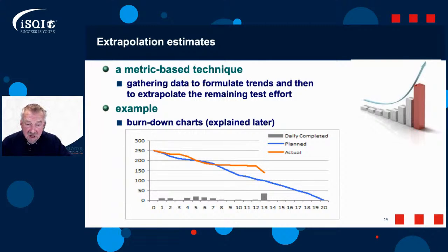And this is used all the time in Agile to try and get us back on track. And then we use this information later on in the retrospectives to see if we want to improve our estimation. And maybe when we estimated with planning poker, we got it wrong. This story I said was a 2. Oh my word, that was a gross underestimation, because it took us a lot longer than we anticipated. And you clock it in your heads, and you go, okay, last time I thought this was a 2, I'm going to be a little bit more prepared next time, and I think this is now more of a 5 in terms of estimating the user stories.